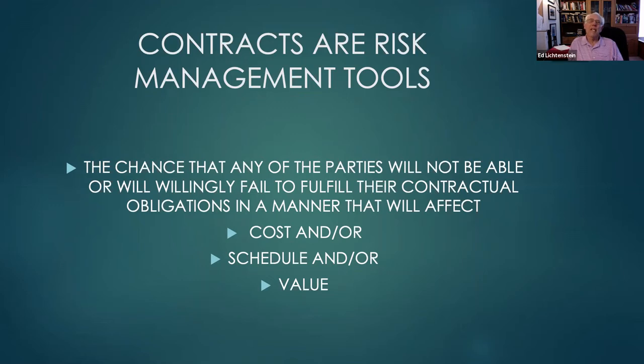All right, let's take a contract that says time is of the essence, which contractually means that you have to strictly adhere to the timetable of the contract. Can you truly perform that in that time schedule? Is there a chance you may be late, and you don't want to be held to the standard of time of the essence?